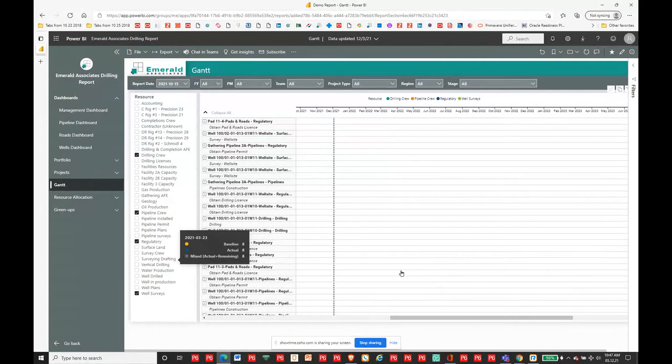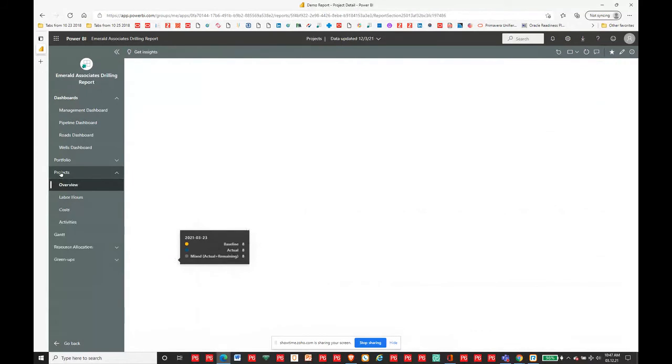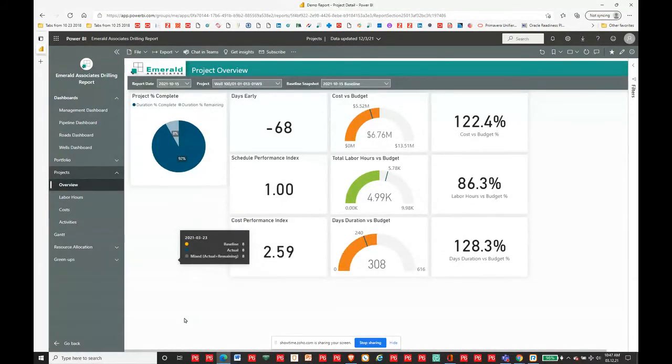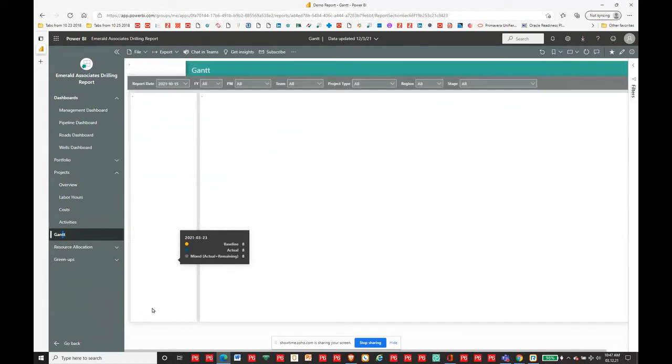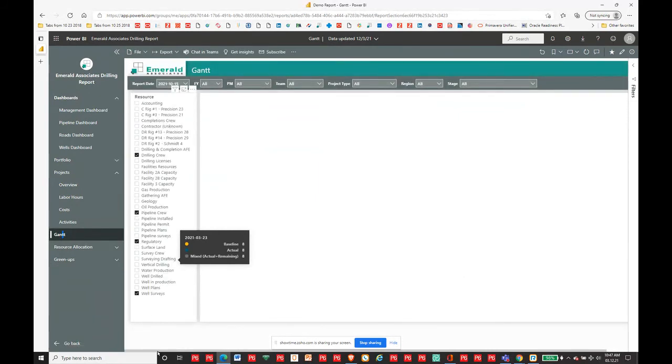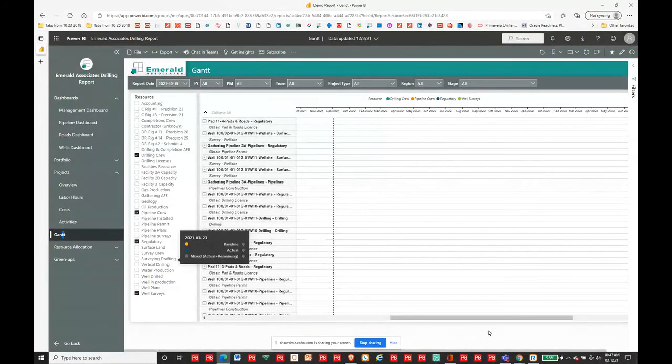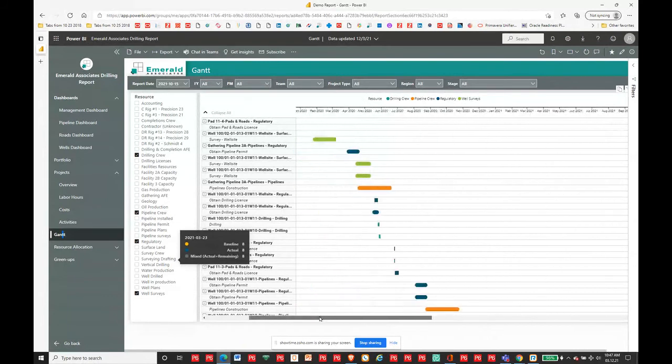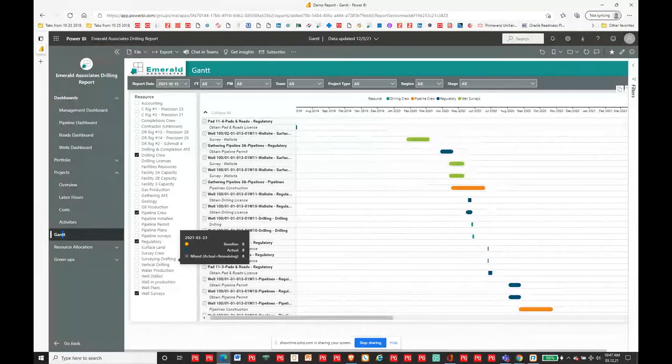Plus, they've also added the ability to do role limits and role costing to change over time. These are important things if you're trying to do better cost control and better resource control in P6. Okay, so I think I've touched on some of the questions that were coming through.